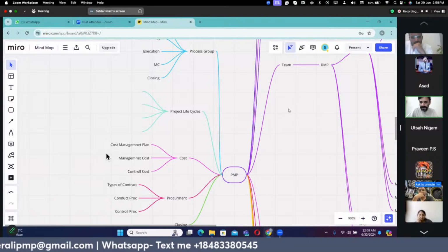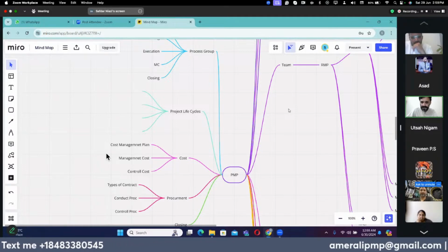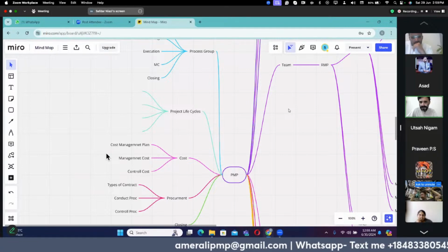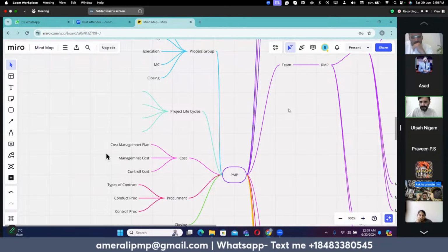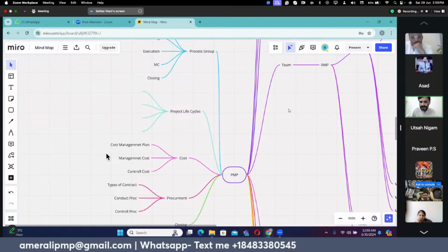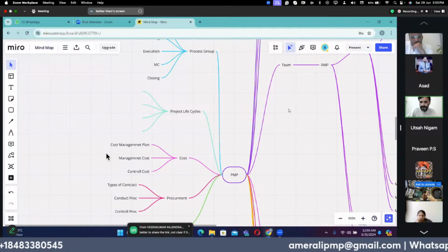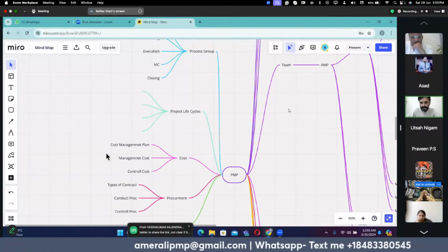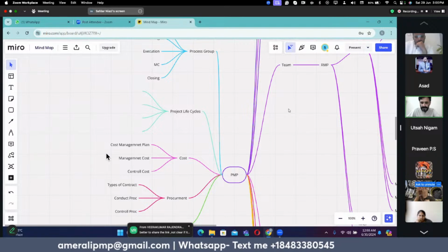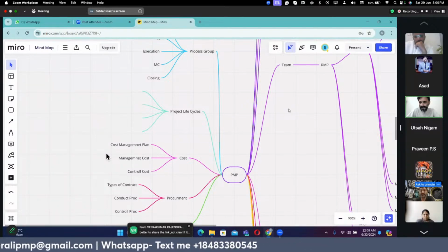Then we go to the stakeholders. Stakeholder identification is the first step, through which we use expert judgment, EEFs, OPAs, focus groups, interviews, workshops. Categorization: upward, downward, sideward. Prioritization: power and trust measures, stakeholder cube, salience model, stakeholder engagement plan, strategy to engage stakeholders on prioritization. Next, communication, and I will request Vishal.